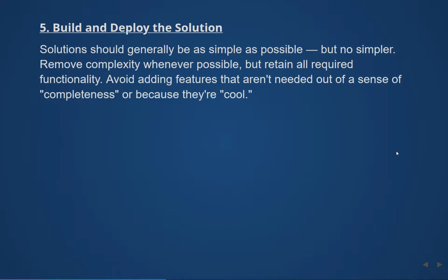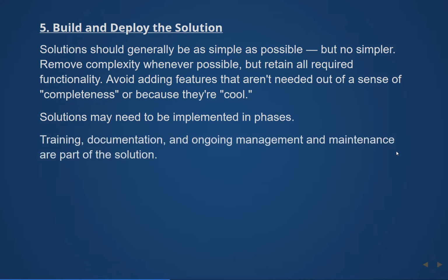Don't add extra features out of a sense of completeness or because they're cool. You might implement solutions in steps instead of all at once. When you hand over a solution, the training, documentation, and management and maintenance procedures are all part of it.